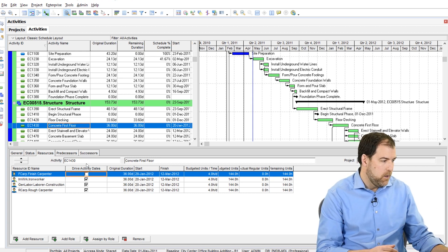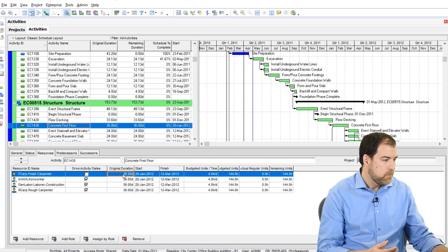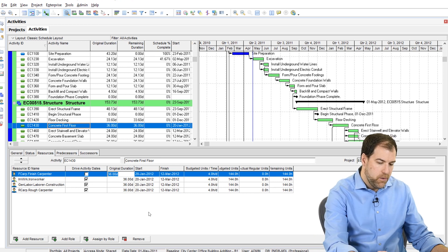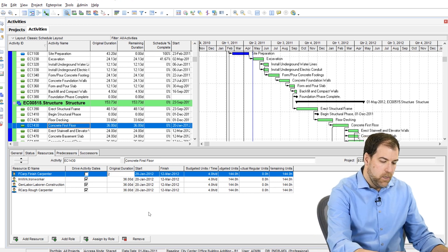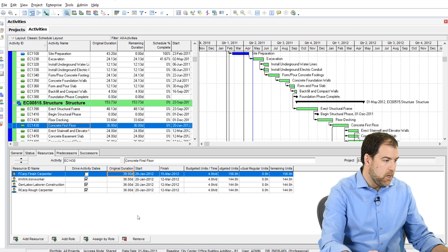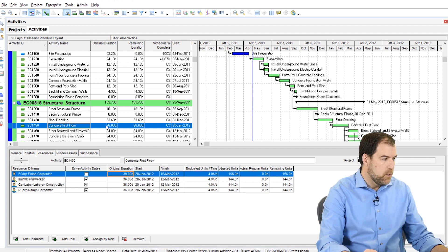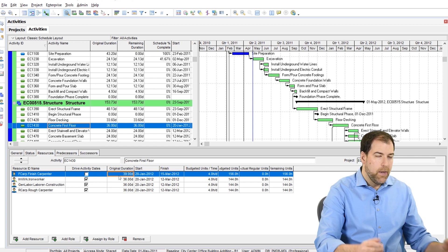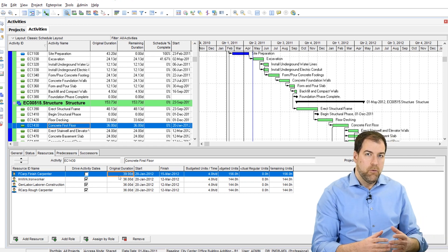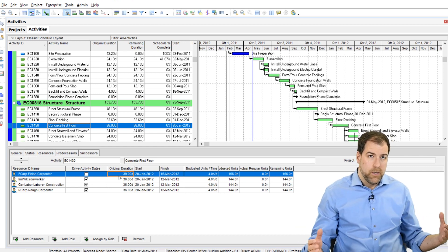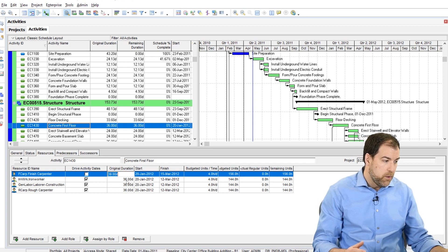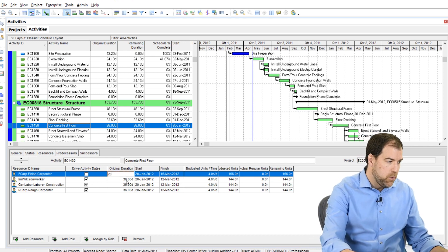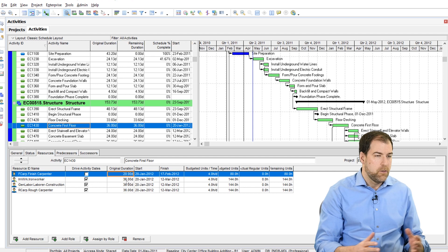So if I uncheck Drive Activity Dates, what happens now is that this duration can actually grow to be bigger. It's unlinked from the activity duration. See the activity duration is still 36. But now I can have a resource assignment that's actually longer than the activity duration or shorter if you want. So it could be, say, only 20 days of the 36 total.